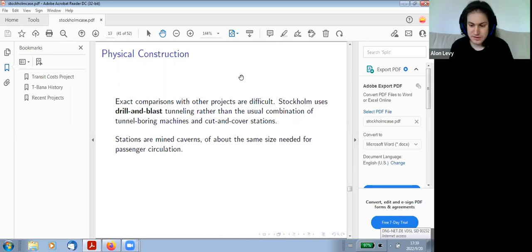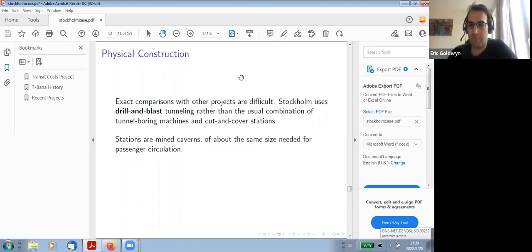Eric, Elif, you sat in on the same interview with me with Norbillion. What did we say the uptime of the best TBMs was? Was it that the best TBMs are one third uptime or something like that? The best is 40%, but it's much more likely to be in the 20s. And I think for Second Avenue Subway phase 1, it was like 23%, if memory serves correctly. But the very best is 40%, which is not common. Yeah, one third would be very good, according to all the people we've spoken to.